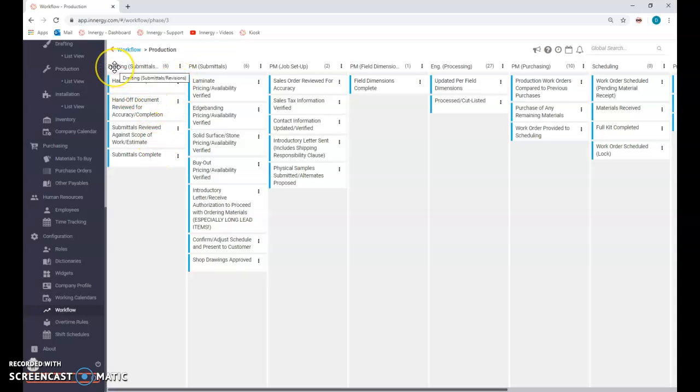So you can see that in order for a drafter to begin working on submittals, or an engineer to begin working on submittals, I would think it would be important that they receive the handoff from the person who estimated it. The next step would be the handoff document, which may be built into Energy, or we may use our own, and I can discuss that with you guys. I typically have a handoff document, which is basically the job specs. It's important that the drafter reviews them and fills out any missing information that didn't come from the estimate.